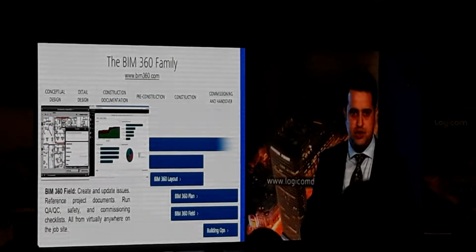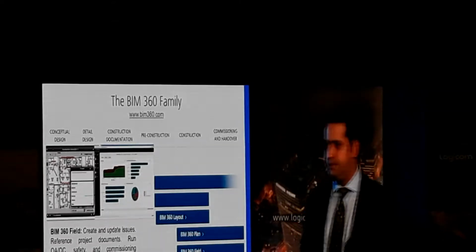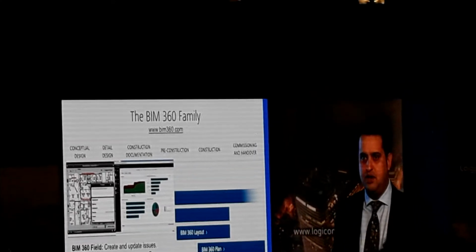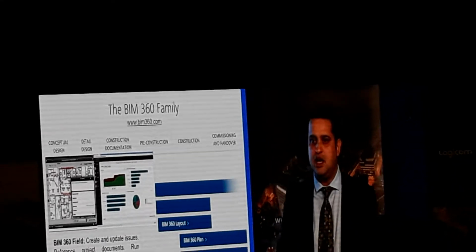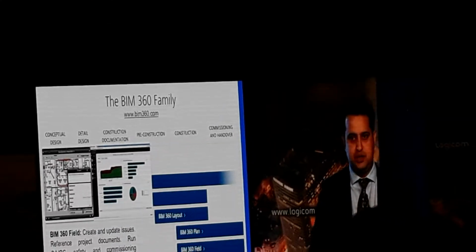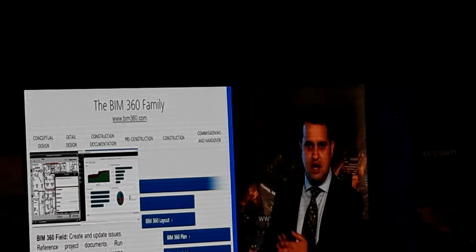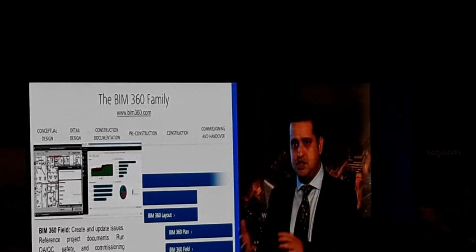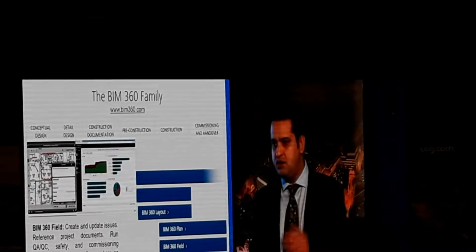Now, what is my favorite in this one is, it allows you to capture as-built information. Now, when you are looking for LOD 500 or your client has asked you to submit an LOD 500 model, that means two things. It means a model location and it means the information from the site, manufacturer information which is relevant for maybe COBie format, non-COBie format.